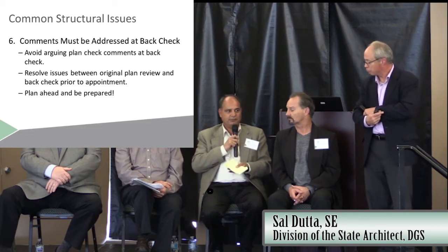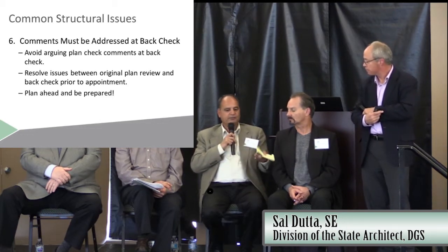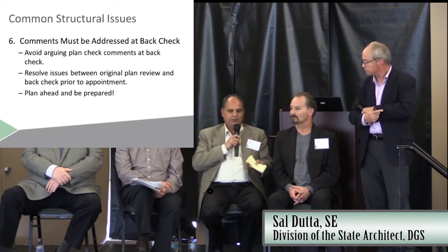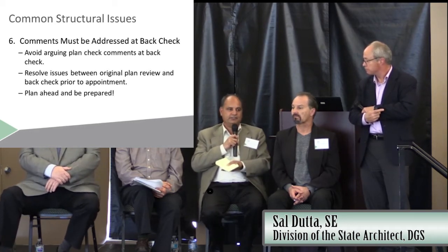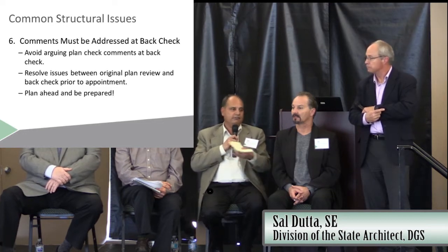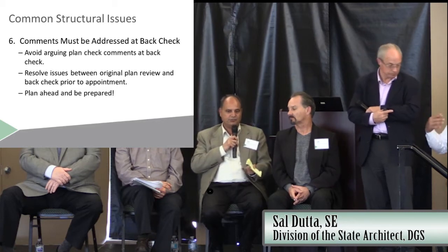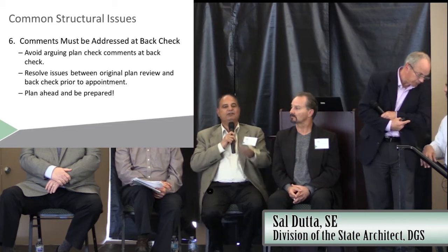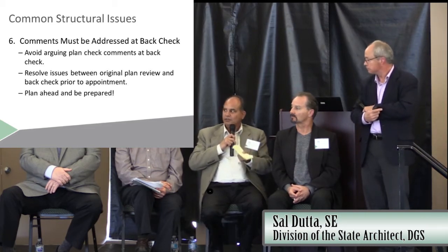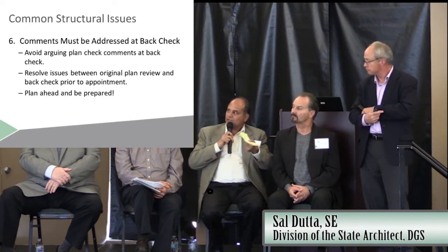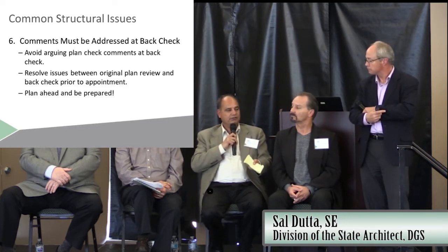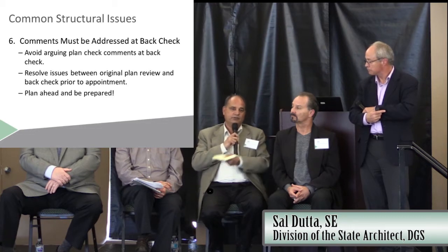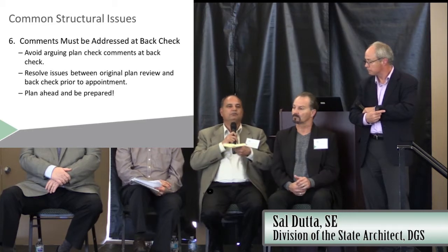A lot of times I see people come in with no response next to the plan review comments, and when they don't have it, they want to discuss everything in the back check room. Guess what? It's going to take a lot of time. Many times I had to return the design professional because the person who showed up was a junior person who never even looked at the plan review comments and wanted to discuss them. Even when we have a notice in the back check room, if you're not prepared to discuss your plan review comments, we will send you back, because we want you to be prepared so you're successful, so we're successful.